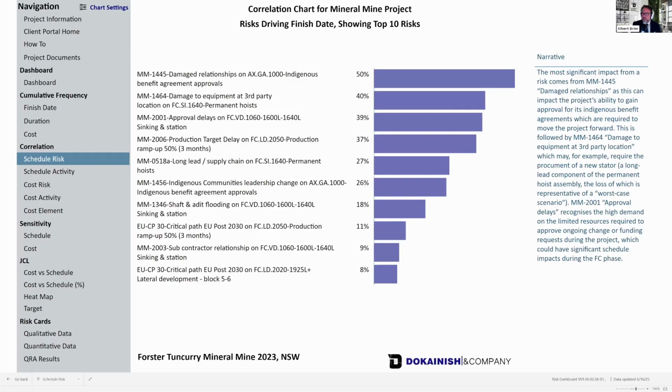So what that means is you build the risk model, and you've got all the risks in the risk model. And then when you run the sensitivity, you take that risk out and then you run the model again. So on a single pass, which is the easiest one to explain and the one that I understand the most, that's how that works, full stop. So if you run the risk model 100,000 times or 10,000 times or 5,000 times or whatever, and then you pull a specific risk out, and then you measure the difference between those results, that is your P50 or P75 or whatever result for that one risk. It's like, if you take that risk out, then the model behaves thusly.